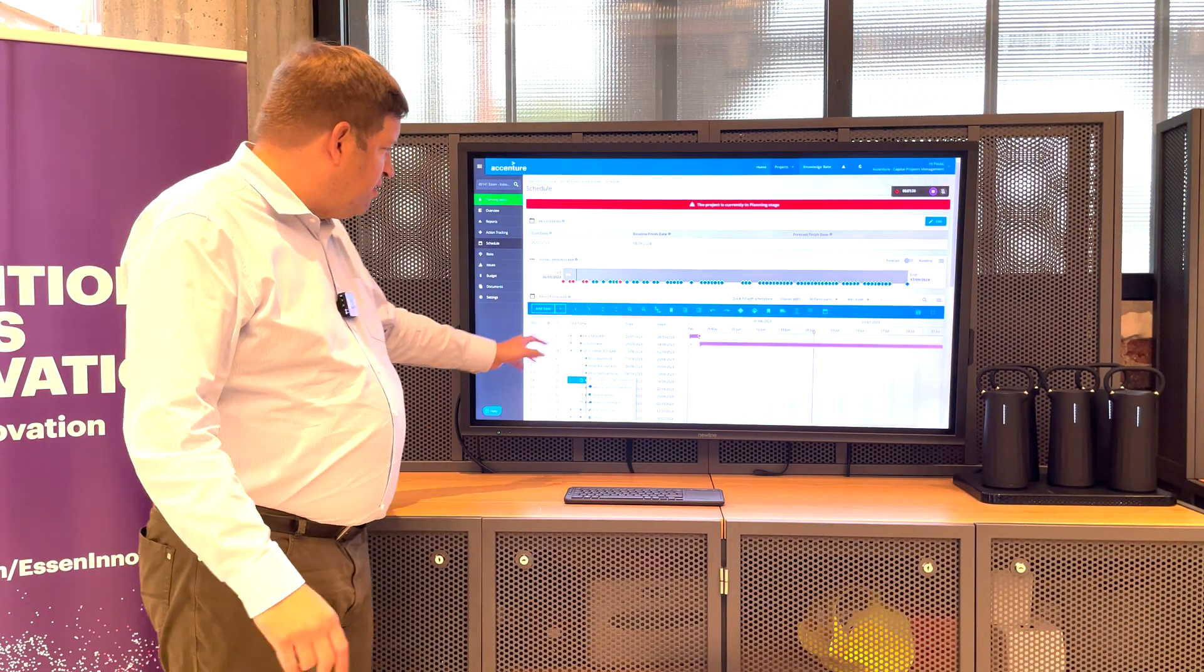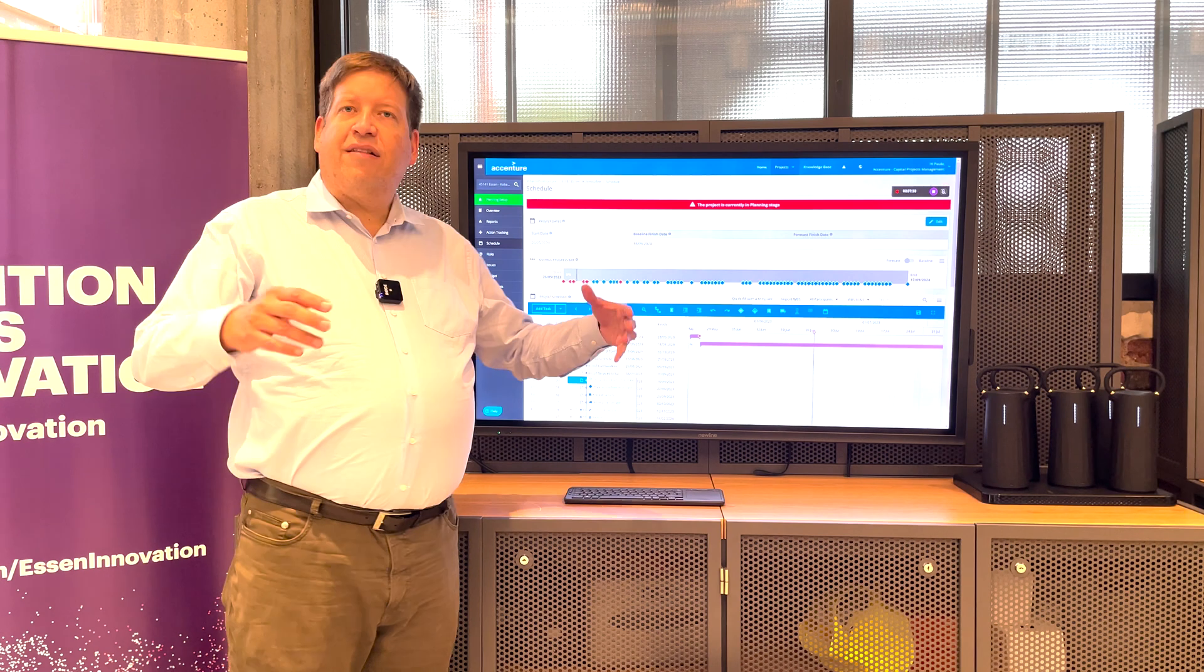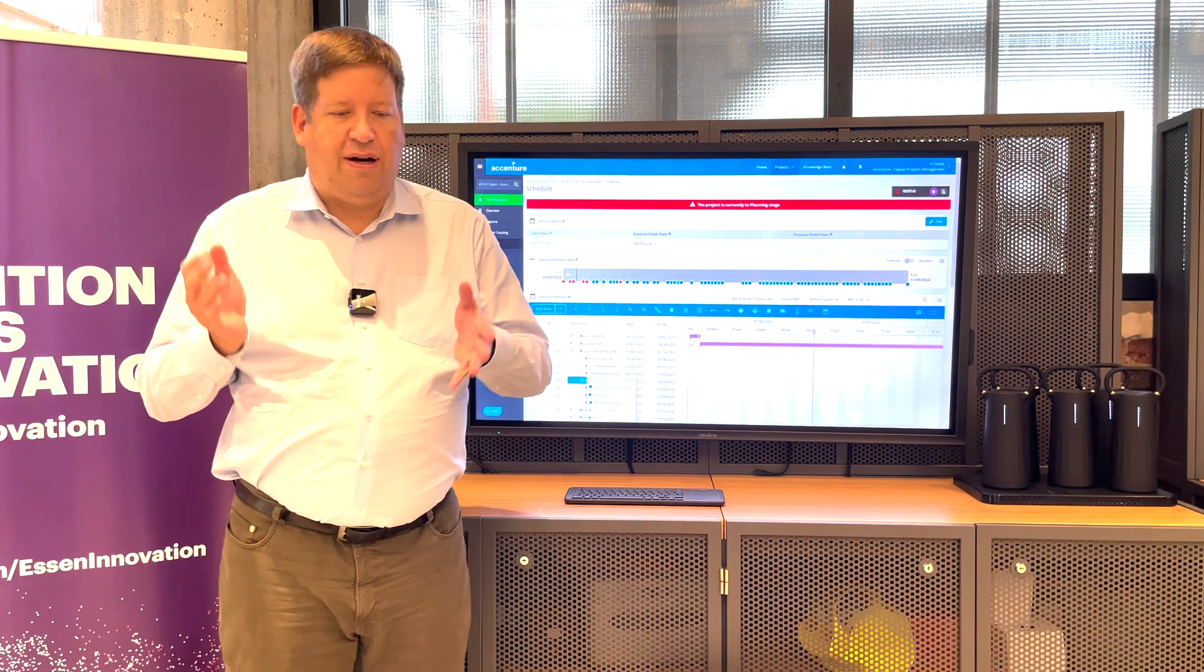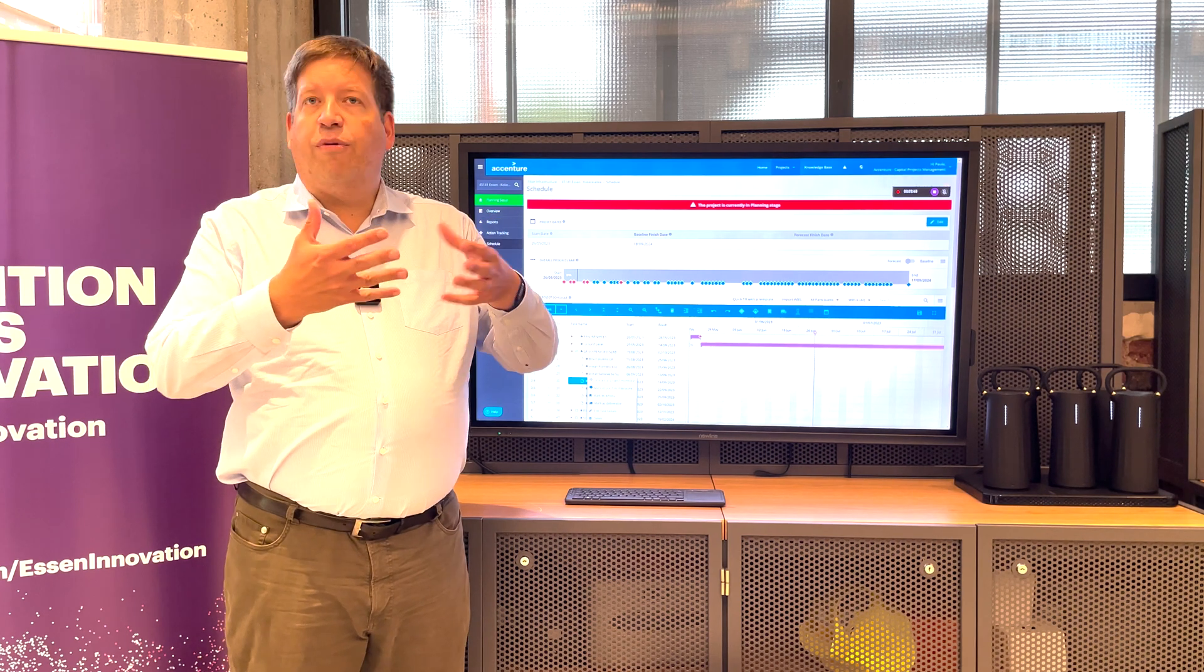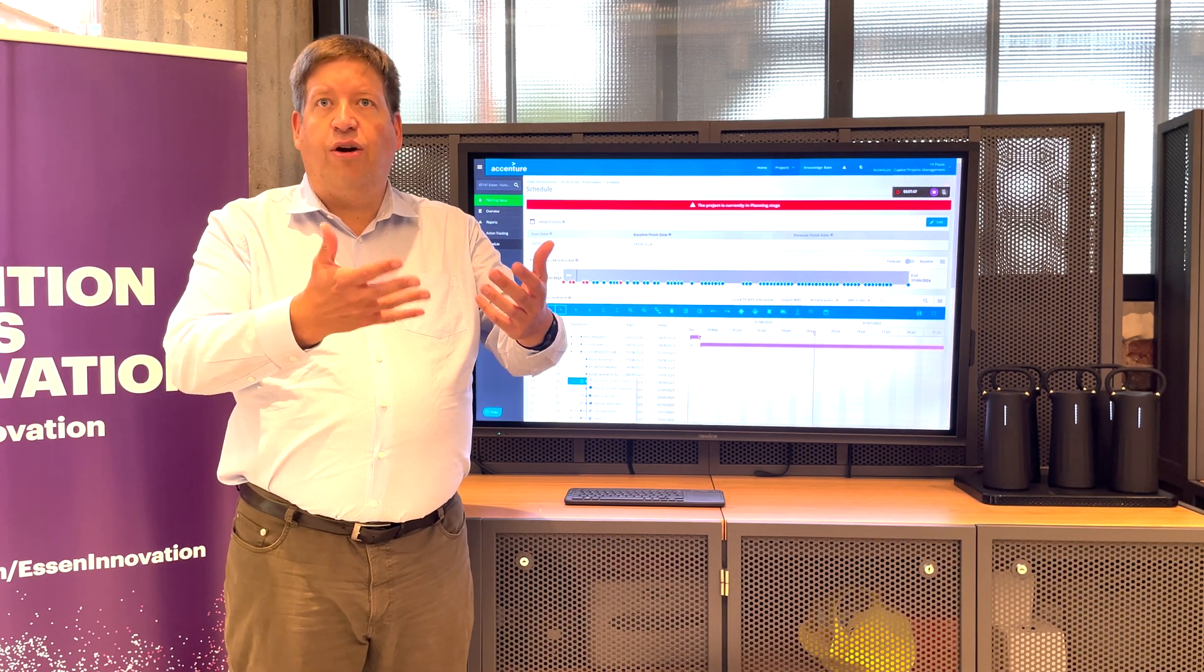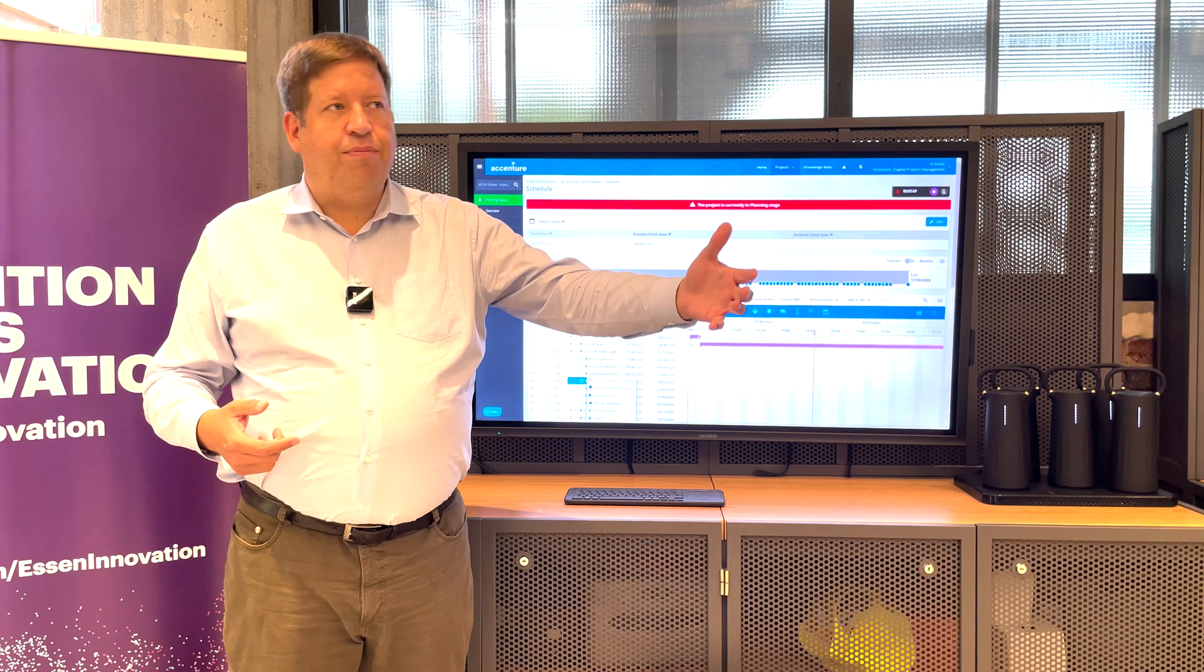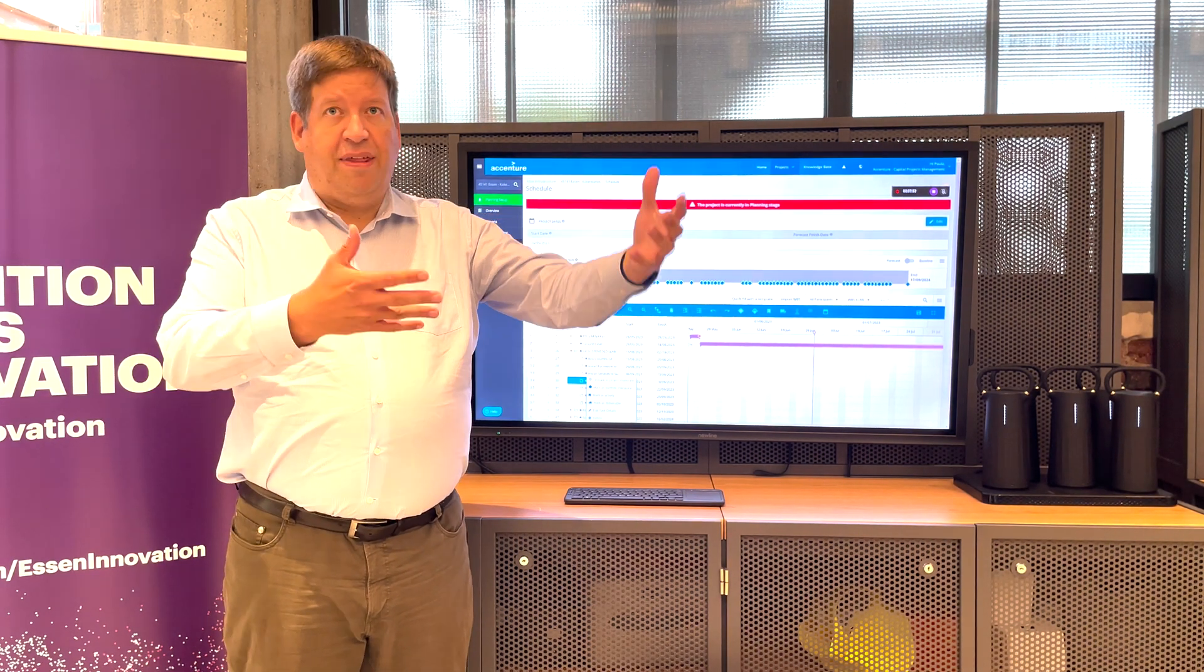By just clicking on it, I can also mark this as a deliverable, which is also really helpful. For example, in a project, you often assign deliverables part of the contract to certain stakeholders. For example, engineering company A is supposed to give you the design for something.